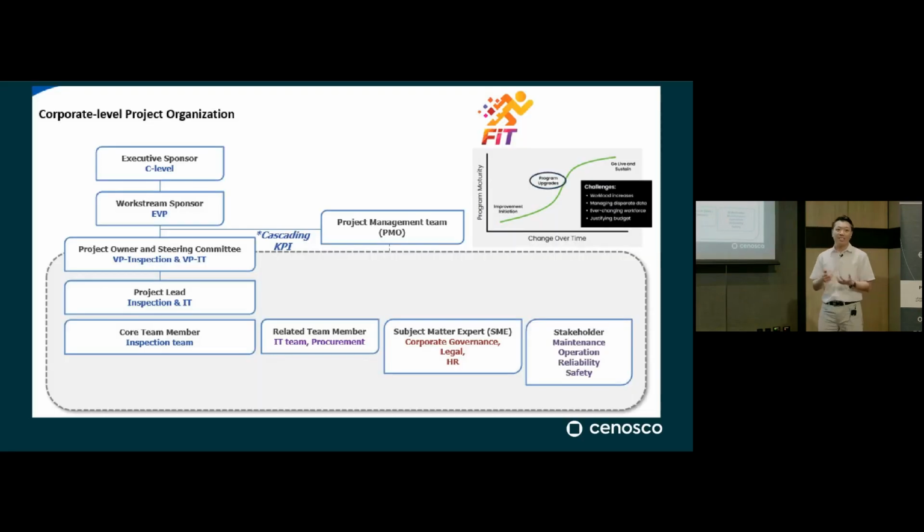This is the project management structure in GC. This project has a corporate-level project organization. At the top, we have the C-level and EVP as sponsors, with the VP of inspection and VP of IT acting as project owners and steering committee members. To ensure alignment, we set up KPIs and cascaded them from management to the working team. In the working team, we have a project lead from the inspection department and the IT department working together. We have a comprehensive team, not just inspection, corrosion, and integrity, but also IT, procurement, legal, HR, and stakeholders.